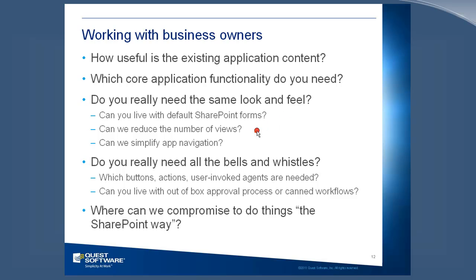A big one is, can you reduce the number of views? It was really easy for end users to create views, and so they often just added more and more views to their Notes databases. They don't necessarily need that done by the migration team. Often what makes sense is to pick a few views that you really need in the application. If over time users decide they want to look at things in different ways, power users can go build new views easily in SharePoint. So we try to focus the migration on just the core views that are really needed, and then come back later and let end users build additional views if they need them.